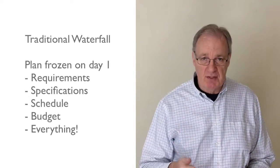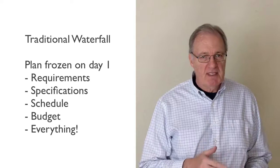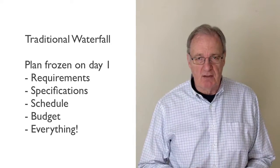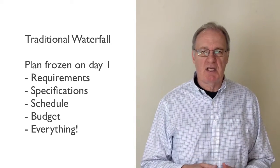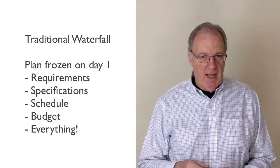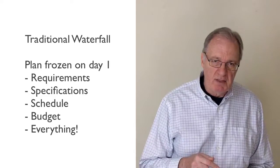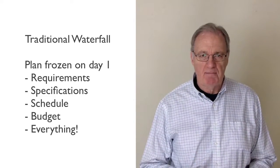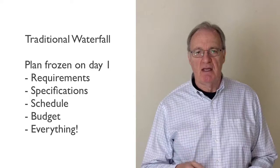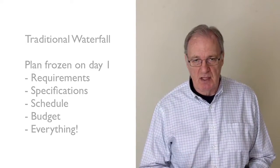Once the phase has been completed, it's very difficult and costly to go back and make changes. There's no room for error, so the initial specifications and requirements need to be comprehensive and frozen. That's how software was developed years ago, because at that time it was the only way to do projects. And the customer knew what to expect because he defined the requirements and specifications and agreed the time schedule and the cost before the project work started.